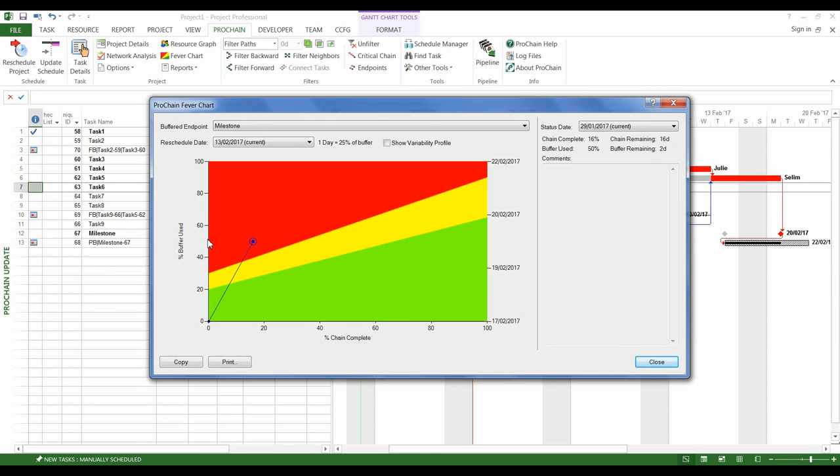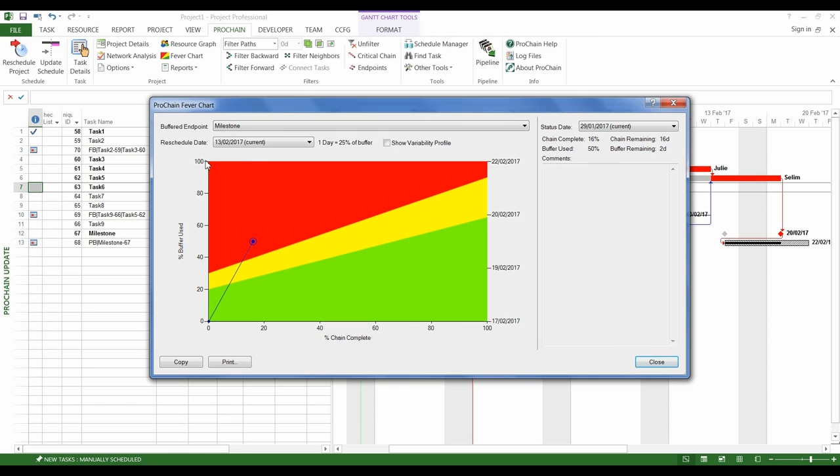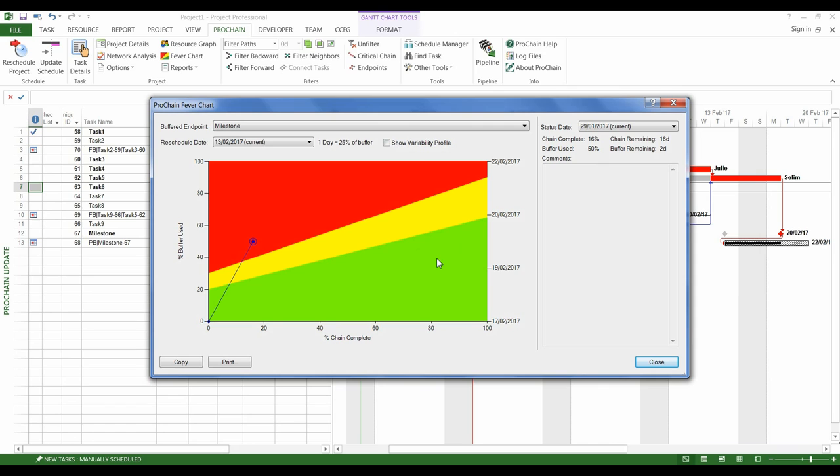So, the point in the red zone means that we consumed the buffer too fast. And at this pace, all the buffer will be consumed before the end of the project. In other words, we'll be late. So, the manager must find solutions to accelerate the project execution and shrink the buffer consumption, so that the point goes back to the yellow zone or to the green zone.